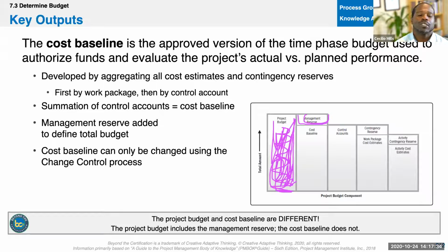So in construction, we sort of call this allocated reserves and unallocated reserves, right? You'll have like a pot of money that's specific to plumbing, to electrical packages, to finishes, right? Then you'll have contingency money that's just for the entire project, right? If any one of those aspects goes over their contingency, we have a little bit more. So that's the idea. Now that you've got all of that, you may have a WBS or control accounts. But if you don't, that entire number, right? You had your little estimates and you got this. That entire number is now reflected here in the cost baseline.